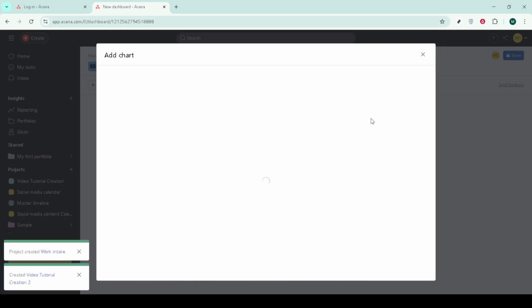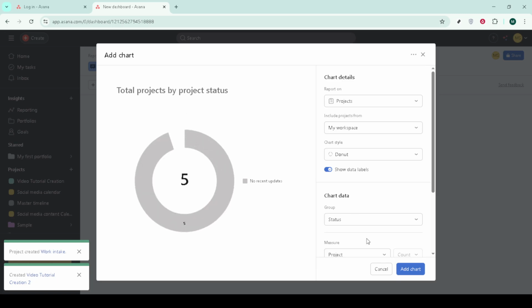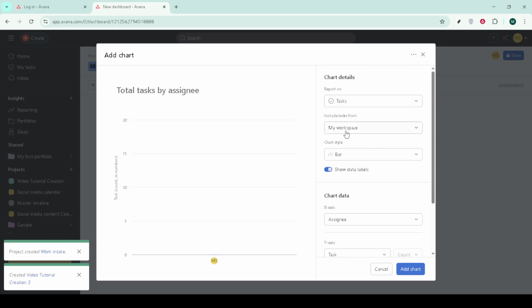During sprint planning, move the prioritized tasks from the backlog into your sprint board or sprint section. Set the sprint number field, assign owners, add due dates or target milestones, and confirm estimates. This is also a good moment to double check the sprint goal for focus.